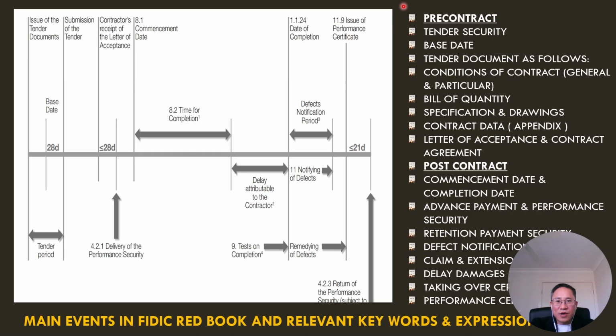The first is the pre-contract period, and the second the post-contract period. The pre-contract period is the time from when we issue tender documents to tenderers until the time the employer awards the contract to the successful tenderer, and the post-contract is the time when work starts on site until the contractor completes their obligations under the contract.